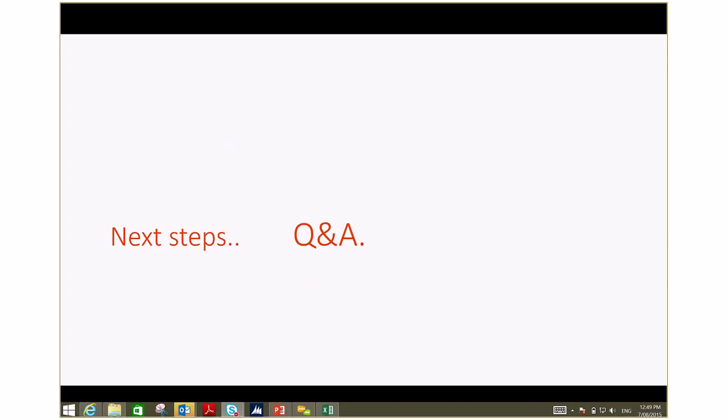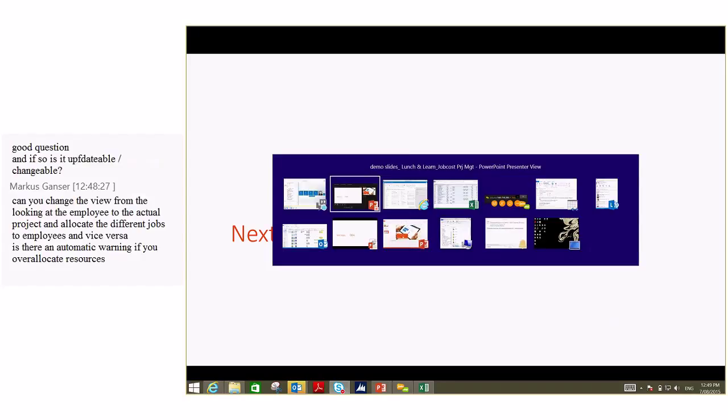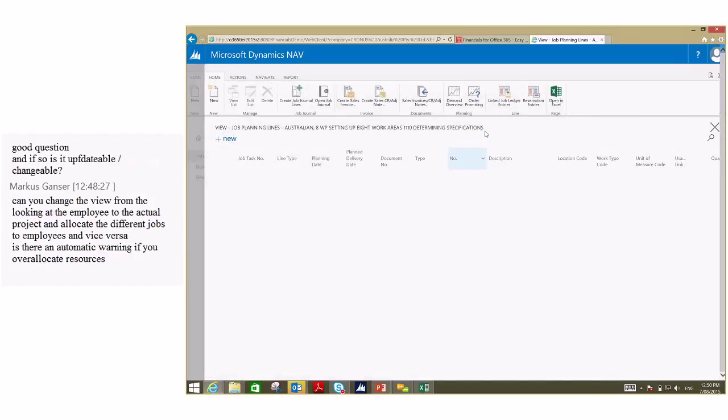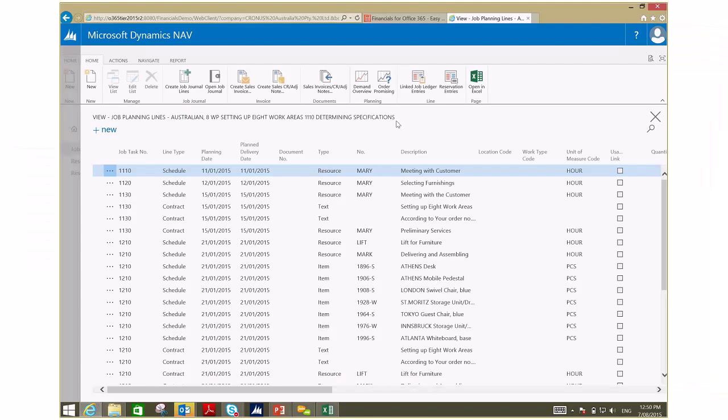So one of the first things, going back to the beginning, is really explaining the difference between schedule, usage, and contract amounts. That's a very good question. So, just to reiterate, a scheduled amount is in essence your budget, and your contracted amount is an agreed upon amount that you have with your customer. So that is essentially an amount that's definite. And a good way of visualizing that in your head is that scheduled and budgeted amount is the times and materials aspect. A contracted amount is a fixed aspect of contracting.